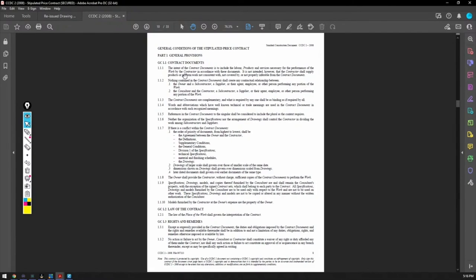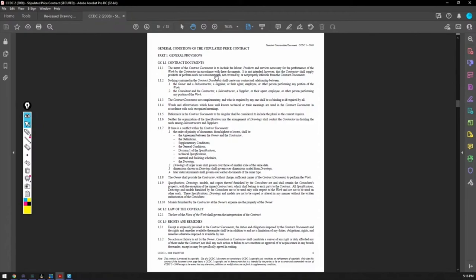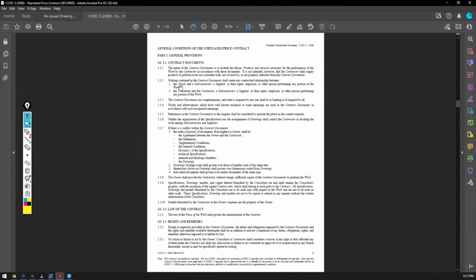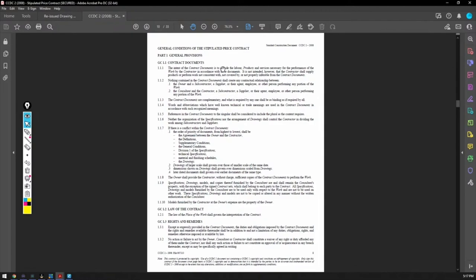Working day contract documents, GC 1.1. General conditions, general provisions. The intent of the contract documents is to include the labor products and services necessary for the performance of the work by the contractor in accordance with these documents. It is not intended, however, that the contractor shall supply products or perform work not consistent with, not covered by, or not properly inferable from the contract documents. Nothing contained in the contract documents shall create any contractual relationships between the owner and subcontractor, a supplier and their agent, employee, or other person performing any portion of the work.